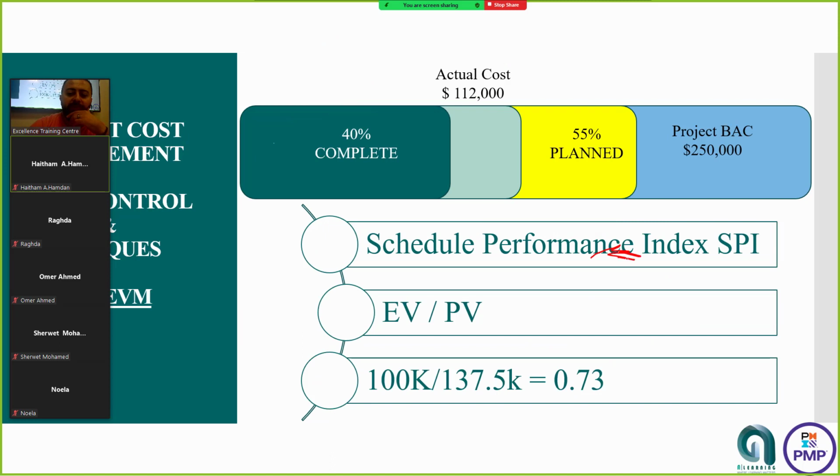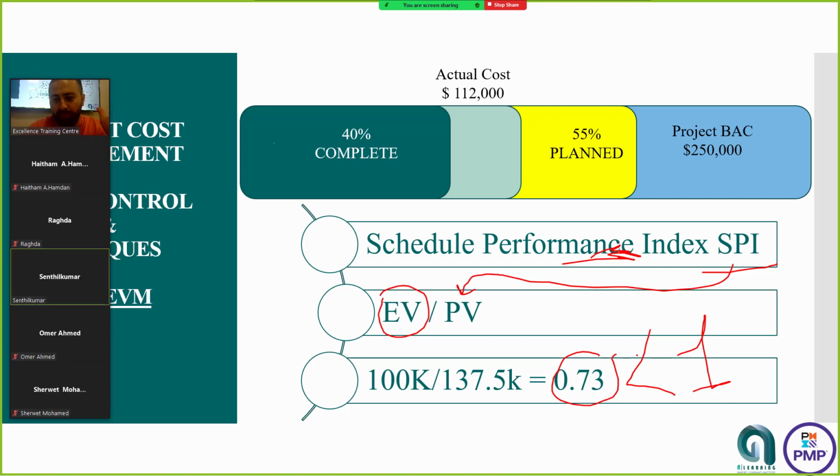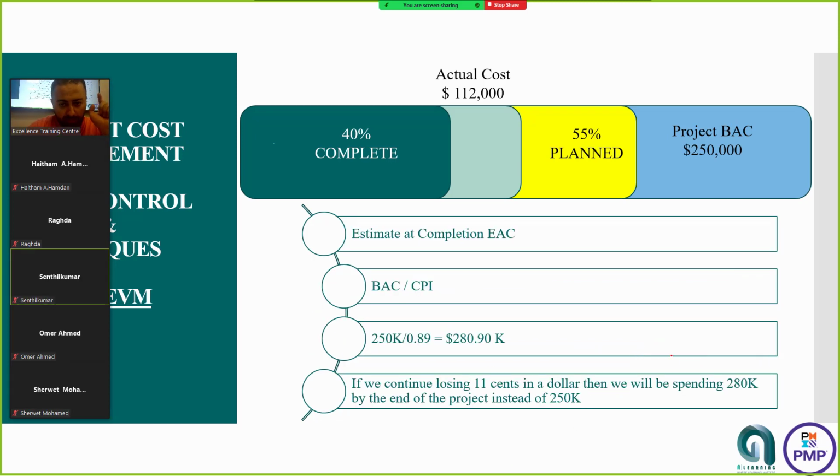And for the schedule performance index, EV comes first. As long as it is a schedule performance index, the second will be PV. If the number is less than 1, the effect is negative on the project. It's a schedule. The negative impact on the schedule means I am behind the schedule. It's structured thinking, right? Systematic thinking. So you need to make an action or a decision as a project manager. Your decision is based on both schedule performance and cost performance. Cool.